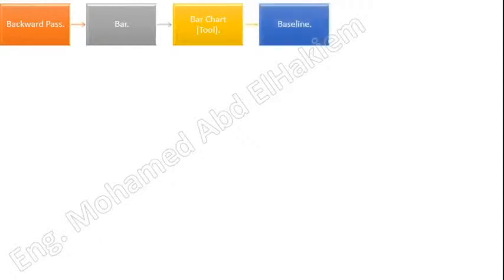Baseline. The approved time-phased plan, for a project, a work breakdown structure component, a work package, or a schedule activity, plus or minus approved project scope, cost, schedule, and technical changes. Generally refers to the current baseline, but may refer to the original or some other baseline. Usually used with a modifier, for example, cost baseline, schedule baseline, performance measurement baseline, technical baseline. See also performance measurement baseline.